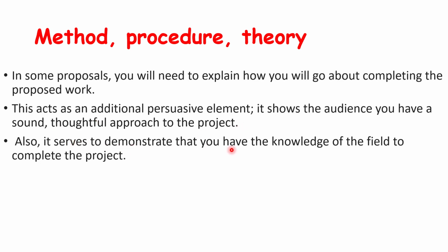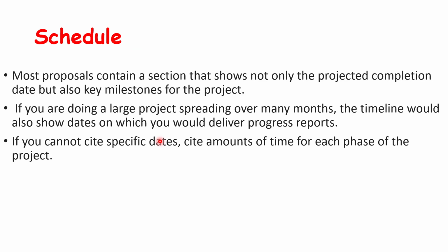Also, it serves to demonstrate that you have the knowledge of the field to complete the project. You know that well. The next important thing is the schedule. Most proposals contain a section that shows not only the projected completion date but also the key milestones of the project. For example, it might include the initiation of the project, the proposal.